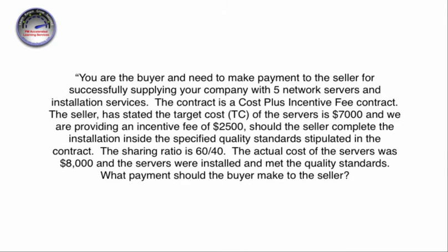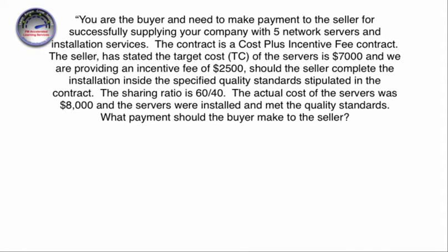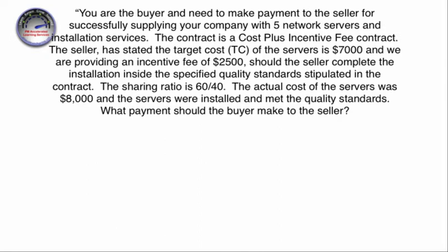Let's go ahead and read the question. You are the buyer and need to make payment to the seller for successfully supplying your company with five network servers and installation services. The contract is a cost plus incentive fee contract. The seller has stated the target cost (TC) of the service is $7,000 and we are providing an incentive fee of $2,500. Should the seller complete the installation inside the specified quality standards stipulated in the contract, the sharing ratio is 60-40. The actual cost of the service was $8,000 and the servers were installed and met the quality standards. What payment should the buyer make to the seller?